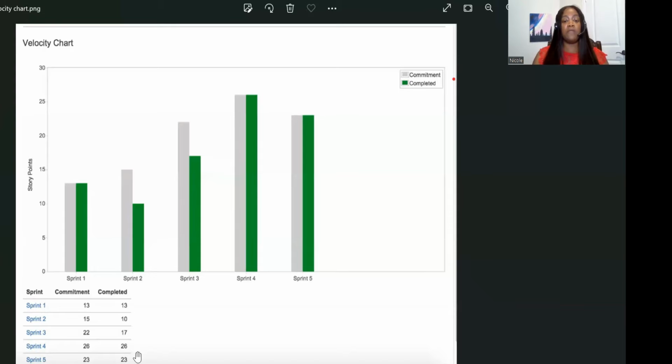However, let them know that if the team completes all of the work ahead of time, they can always pull in more work from the product backlog into the sprint. The product owner can always guide the team on the priority of what they should focus on next, if they finish up very quickly with everything that they accepted in the sprint planning meeting.